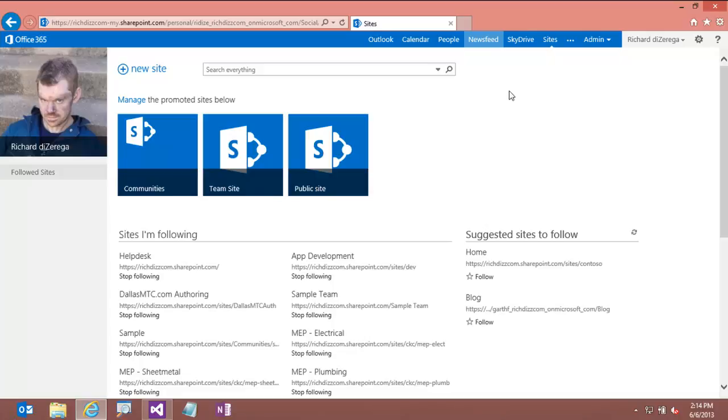Yep, that's actually on our list. We had horrible scope creep in this app. This thing started out, you saw our data model, with two screens originally and about three tables to begin with, and now it's huge. So that was on our list, and it will probably be there in V2. We thought it would be fantastic to do a link integration. Richard and I working together is a terrible combination because we were like, oh, it'd be cool if we did this. And the PM we were working with threw in his own fair share of scope creep as well.